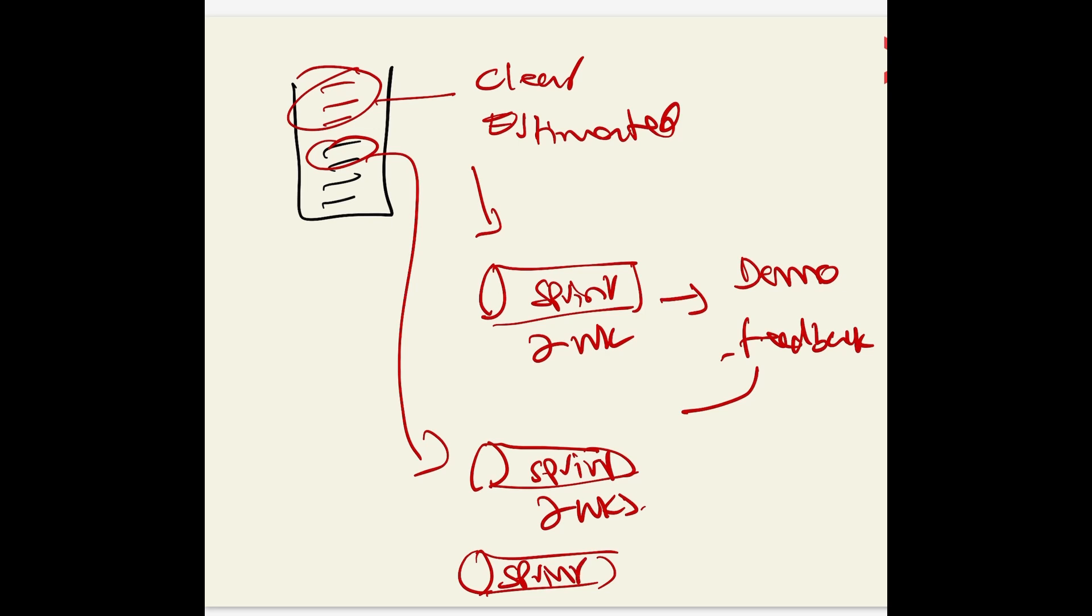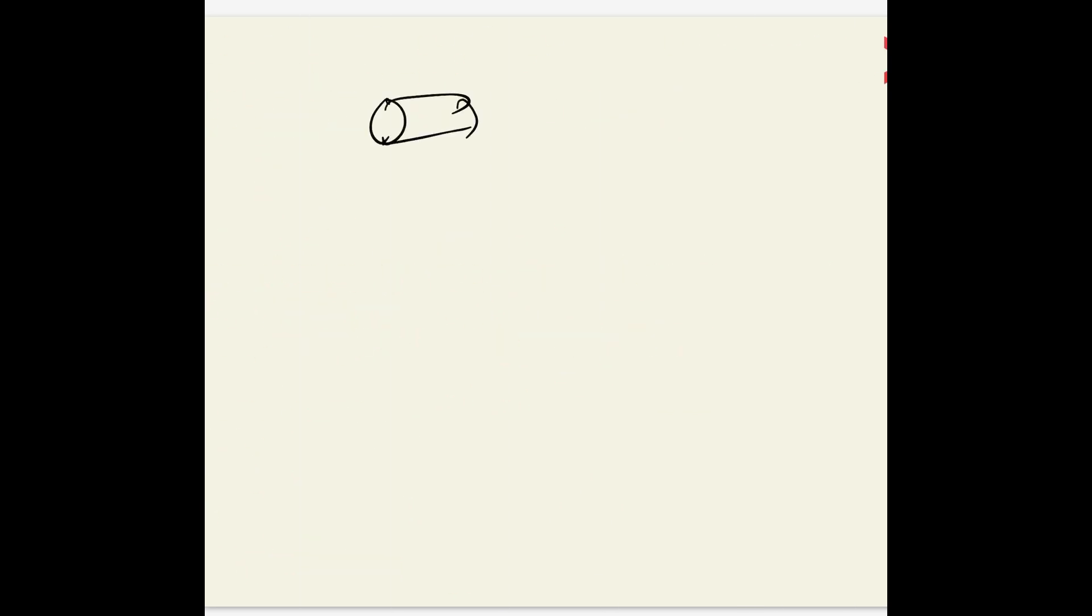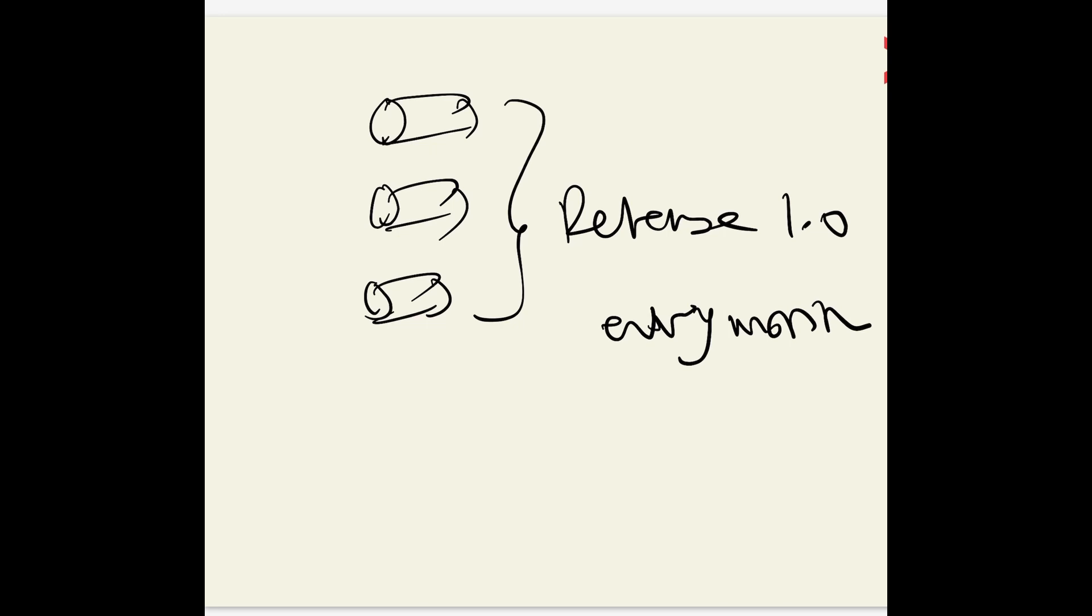Once you've done sprints which are completed, you want to talk about releases. Once you've done so many completed sprints, you want to put them into a release. The release could be every month, but that depends on the organization and the team.